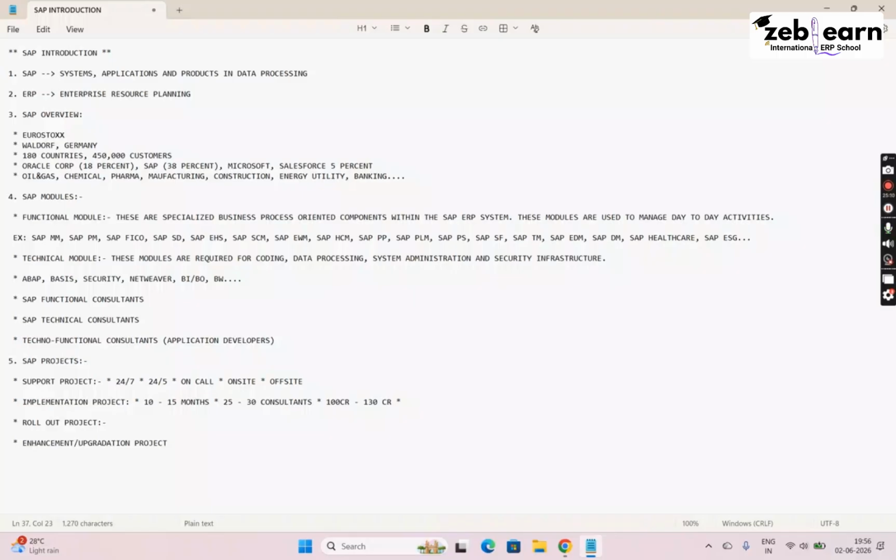Number one, it will be easy for you to mobilize the resources, I mean the manpower. We have a limited number of consultants, you know. So if we start implementing SAP in all the locations, maybe at some location you may get a consultant or not, we don't know, because you cannot fill all the positions at a time. It is very difficult. So that is one reason: deploying manpower at all the locations to simultaneously start the implementation is very difficult.